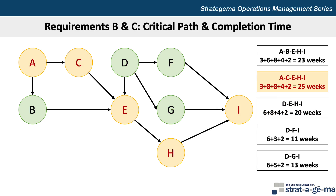Thus, we have 5 paths through the network, with times ranging from 11 weeks to 23 weeks. The critical path is the path that takes the longest, and that is A-C-E-H-I at 25 weeks, and that satisfies our requirements B and C. You can determine your sequence of paths any way you like, but you'll still end up with the same 5 paths through the network.